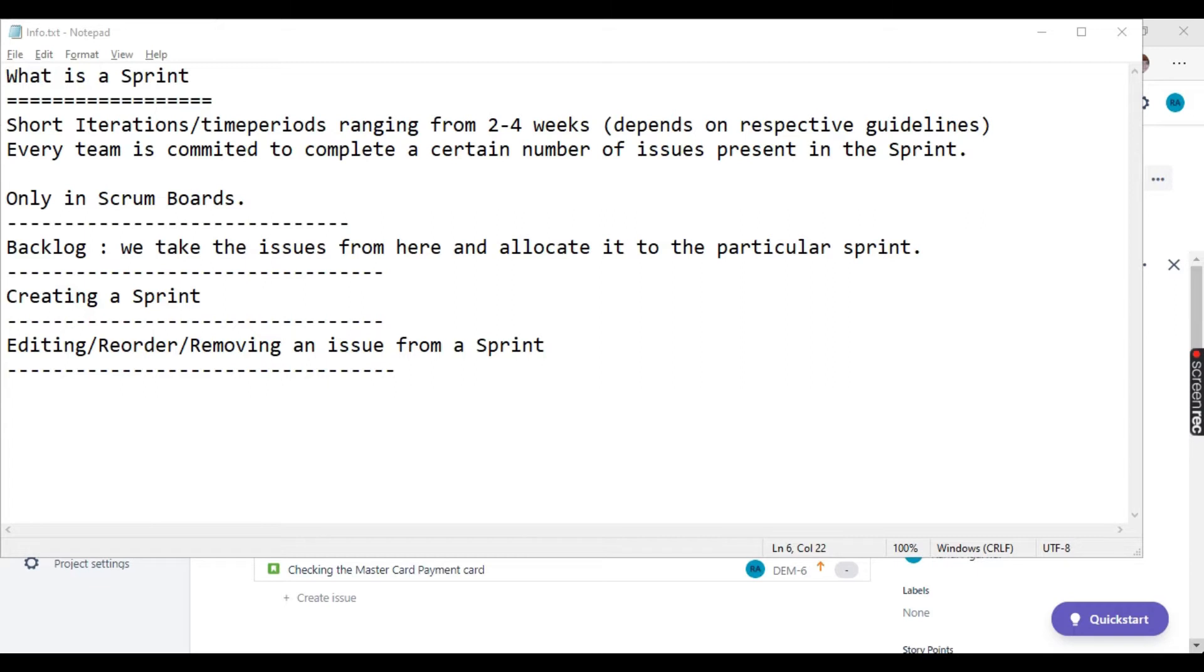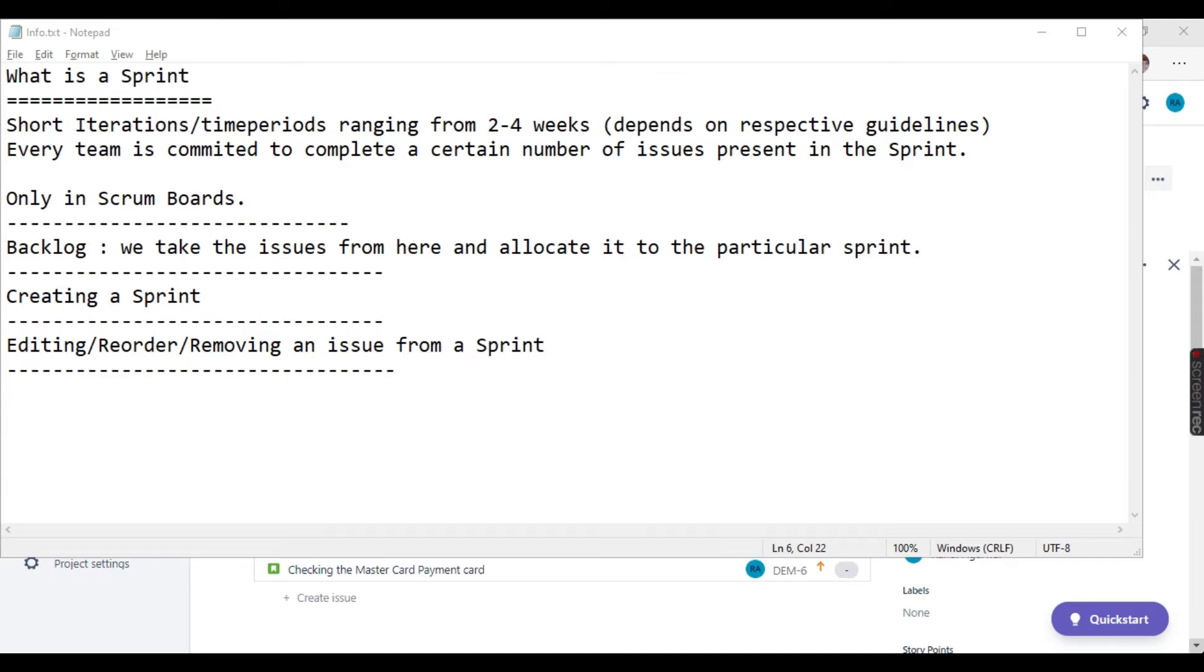The sprint has a specific set of issues that needs to be addressed. So for example, if the sprint is of two weeks, within two weeks you have to work on and complete those issues on time as per the sprint duration. The sprints are available in scrum boards. In Kanban, we don't have any sprint concept. Another important thing is the issues in the sprints are assigned from the backlog. So we take the issues from here and allocate it to the particular sprint. So let us see how we can create a sprint in Jira.